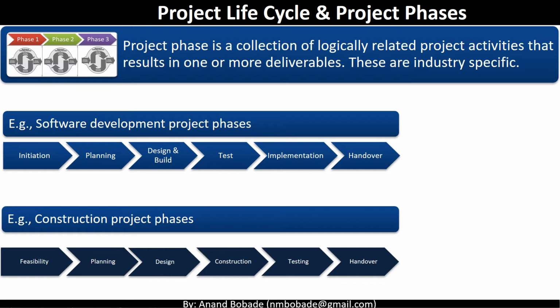The project lifecycle is different for different application areas as we just discussed for IT project and construction project. In fact, some projects may have their own unique lifecycle. For example, you are a vendor and responsible only for a construction bit. So you may not have a design phase in your project, but your project will still have a unique lifecycle for a construction work.